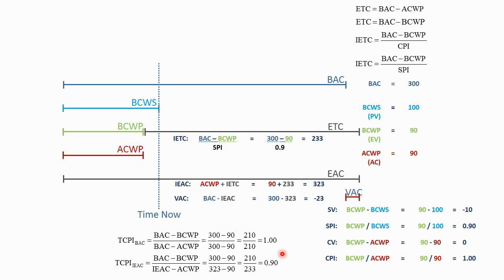Now, personally, I don't like to equate schedule performance to cost performance like this. In the previous example, we had divided this performance remaining by the cost performance index, and there you're comparing cost to cost. If the project had been at a cost performance index of 0.9, it's pretty valid to compute the ETC by dividing by a cost performance index of 0.9.